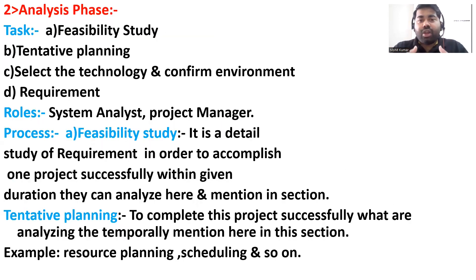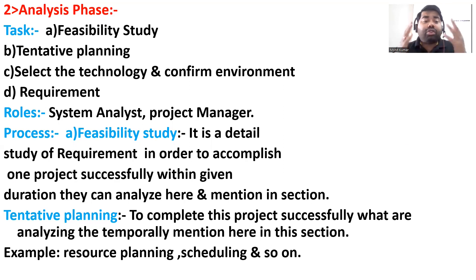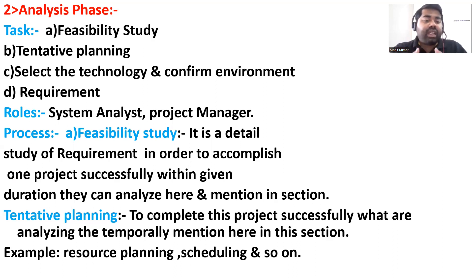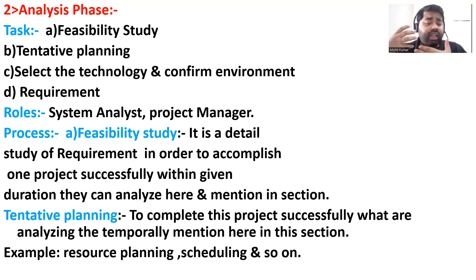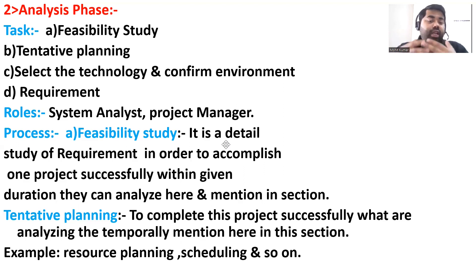The second phase is the analysis phase. The tasks include feasibility study, tentative planning, selecting technology, confirming the environment, and requirement analysis. The roles involved are the system analyst or project manager. The feasibility study is a detailed study of the requirements to accomplish the project successfully within the duration. Tentative planning covers things like resource planning and scheduling.